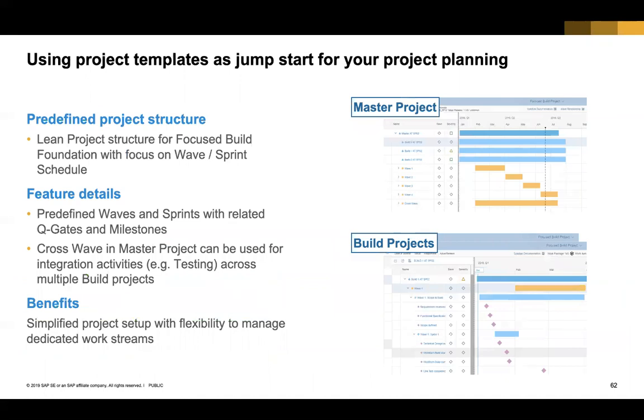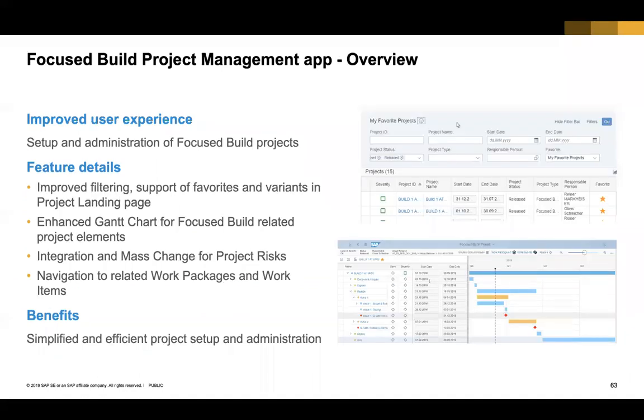It will have a predefined project structure. If you want to use the templates that come with Focus Build, we have a master project template and a build project template. They have predefined waves and sprints, so you know how to define waves and sprints easily using these templates. And if you create a project in Focus Build using one of the templates, you will already see certain predefined work grid structures, which you can adjust further after you've reused the template.